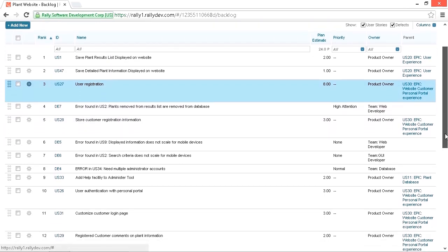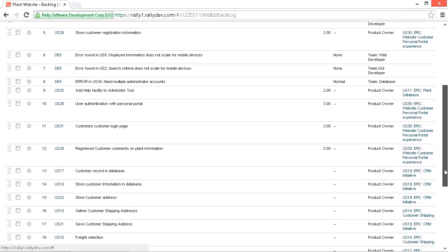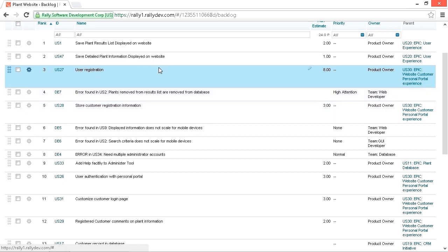While in the product backlog, user stories should be thought of as malleable. During the product grooming meeting, user stories can be changed, rewritten, split, or even deleted, depending on the state of the project and the business needs. And those business needs change as the project progresses. With the product owner's vision, the team will fill in the details of how these user stories are implemented during the sprint. And the customer will correct that vision or add to the details when the feature is demonstrated at the sprint review meeting, which could lead to modifying existing user stories in the product backlog or adding new ones.